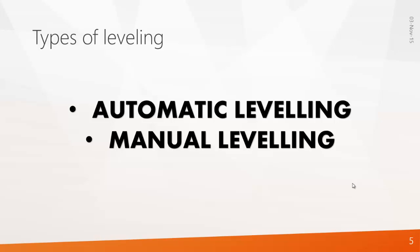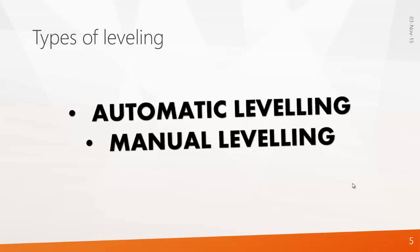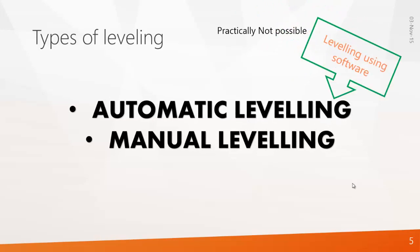Now, what is leveling? To remove the over-allocation in the project is called leveling. There are two kinds of leveling: one is automatic leveling and another is manual leveling. Automatic leveling is done inside the software using leveling options. But this is not practically ideal — most of the time when you level resources in Primavera, the program always pushes the activity, which ends up increasing the project duration. So from my experience, I won't recommend automatic leveling.